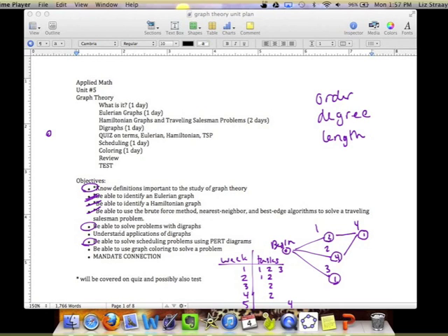Questions on that? Yes. Do we need to know like critical path and longest path? The critical path is the longest path, but no, your critical path will be the same as charting out a table. It's just a little bit easier to be certain of your answer when you chart out a table and a schedule, especially in a really messy graph, to know for sure you actually found the critical path. You would really need to trial and error all of it. So making the weekly schedule is a faster way to the same answer.